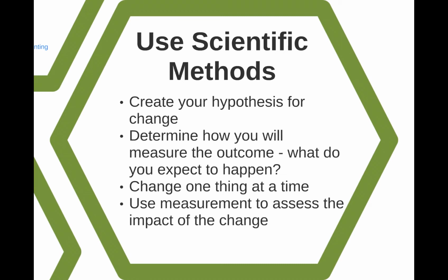So Kanban as a framework says: yes, visualize the work. Yes, throttle back the amount of stuff you do. Actively look at and manage the flow of work. And to continuously improve, use the scientific method, which just means you've got an idea based on what you see, change one thing and one thing only.